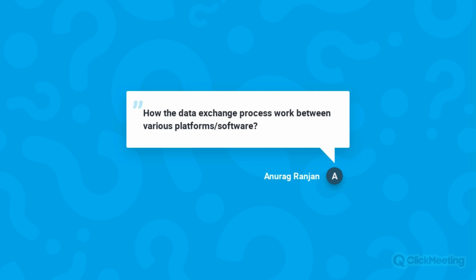How has the data exchange process worked between various platforms and software? That's done in a variety of ways. We import the plan in loads of different formats: Excel, MS Project, P6, Asta, or you can just create a plan from scratch in us, and the models come in IFC format. Likewise, you can export from Visilean in several different formats. You can export back to the planning software you used, or you can export to PDF, CSV. Not sure if there's anything to add on that one.